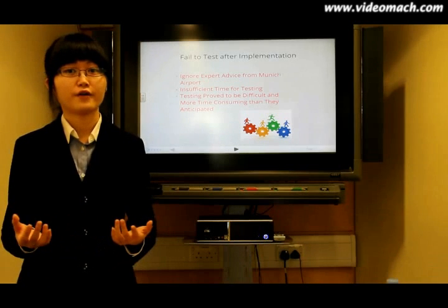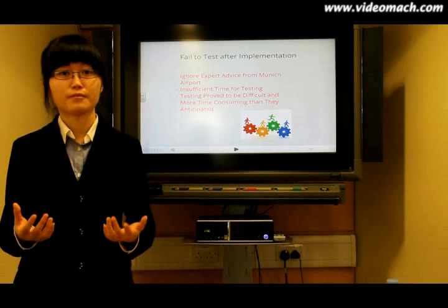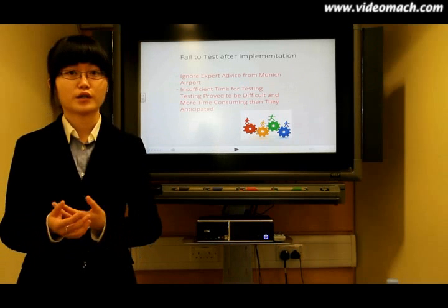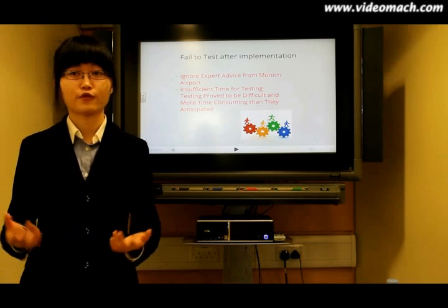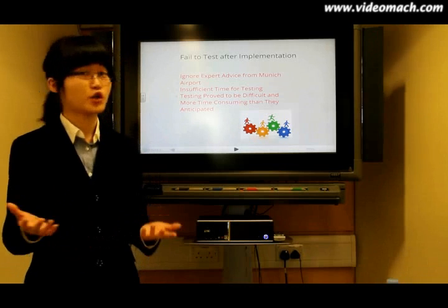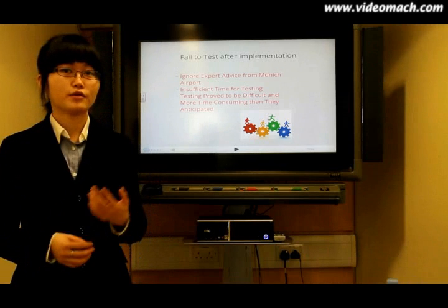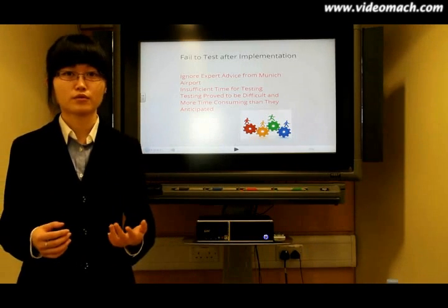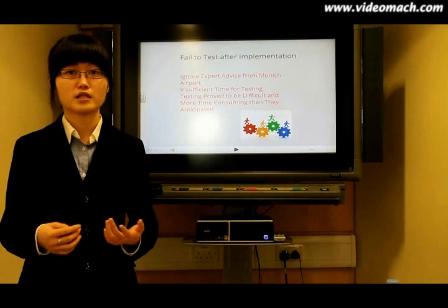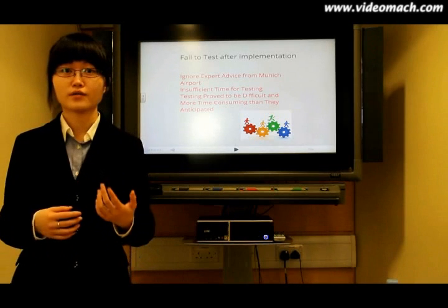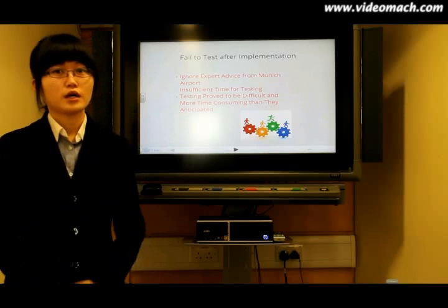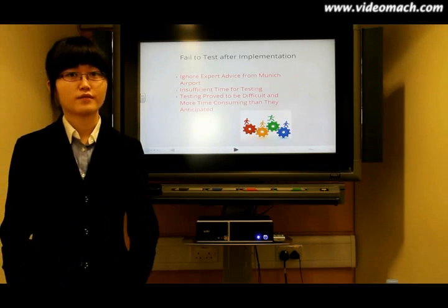In fact, they scheduled a 21-month plan without including physical testing of the full system design. Even when they tried to test the system, it seemed more difficult and time-consuming than they anticipated. Because they did not run the test, they found many issues when they first started to use the system.